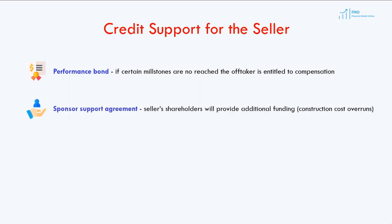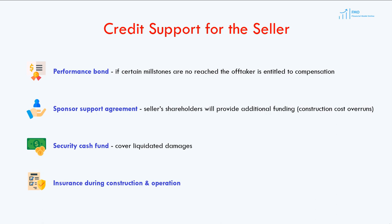A sponsor support agreement, which represents guarantees from the seller's equity investors, may also be required. These are guarantees that additional funding will be provided by the investors in case of a funding shortfall, for example due to construction cost overruns. The seller is also required to set up and maintain a security cash fund that the off-taker can draw on to cover penalties payable by the energy seller. Finally, the energy seller is required to acquire and maintain appropriate insurance during the construction and operation of the project.